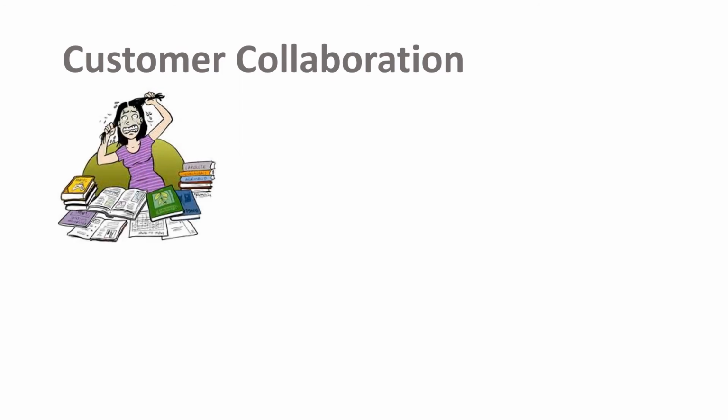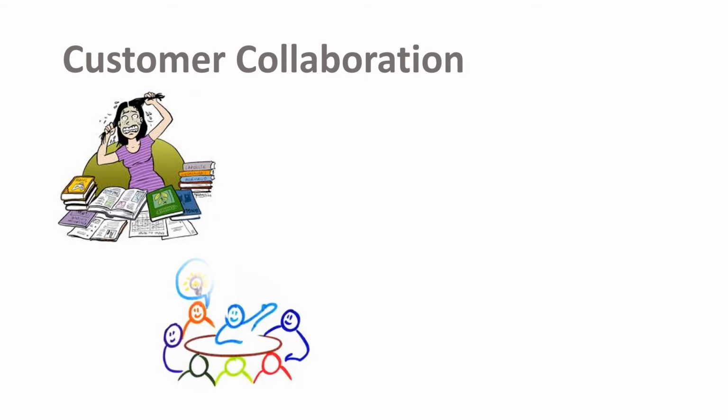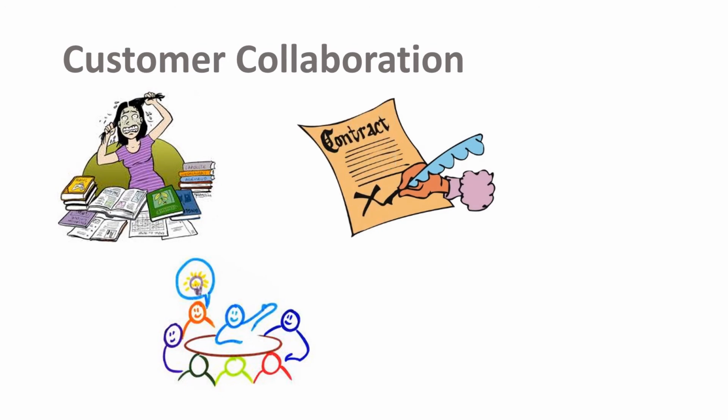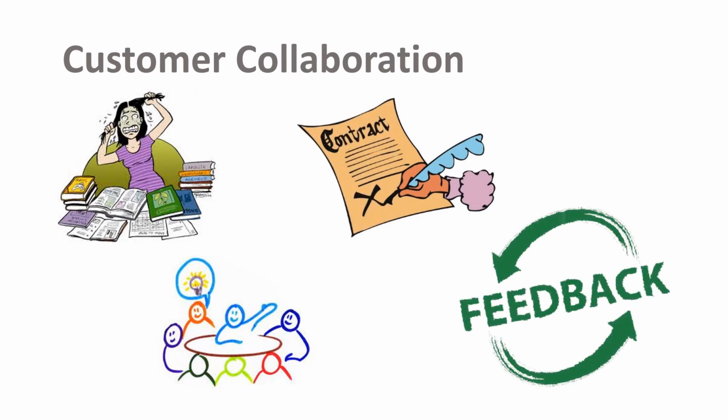It is a challenge to successfully capture all customer requirements at the beginning of the software development cycle. In addition, it is difficult to get customer feedback without showing the actual working software to the customer. So it is better to directly involve the customer in the development of the software and deliver each iteration or sprint to the customer for direct feedback. Instead of negotiating contracts with set specifications, gather live feedback from the customer and accommodate any changing requirements. This assures that the software is being built directly with the features the customer has in mind.